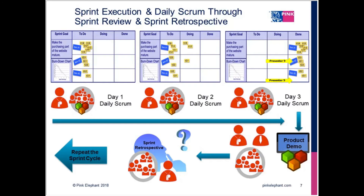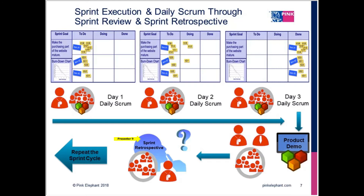At the end of the sprint, all three roles attend the product demo along with stakeholders. The team demos working, finished software — no PowerPoint slides — and stakeholders confirm it's done and what they wanted. Items can then potentially be deployed. After the sprint review, the team does the sprint retrospective: approximately four hours for product demo and three hours for retrospective in a two-week sprint. The development team does continual learning — inspect, adapt, and be transparent. Then the next sprint cycle begins, and this continues until the product is finished.